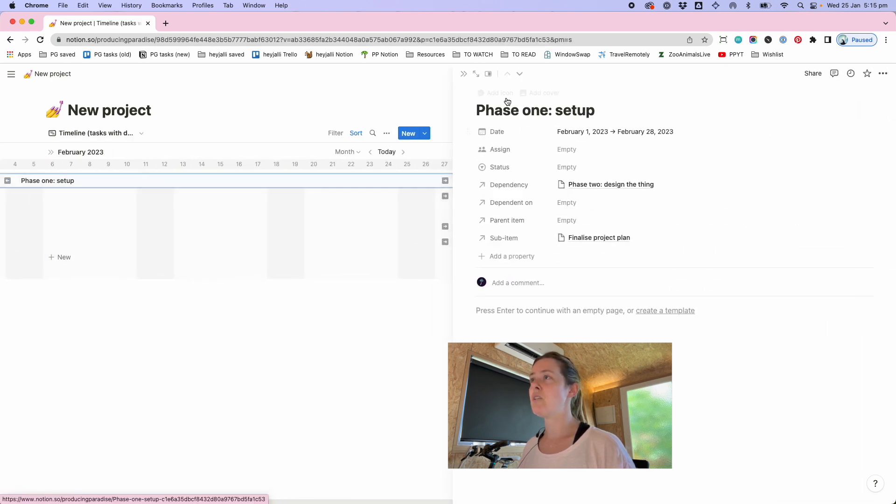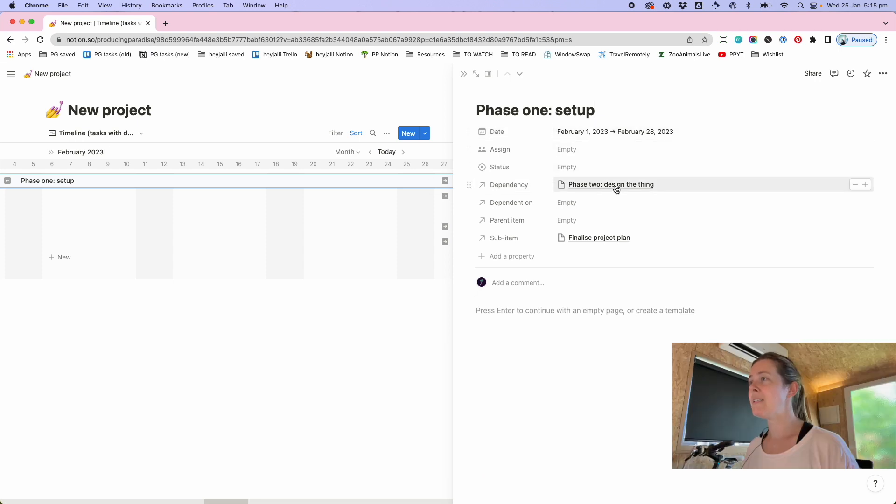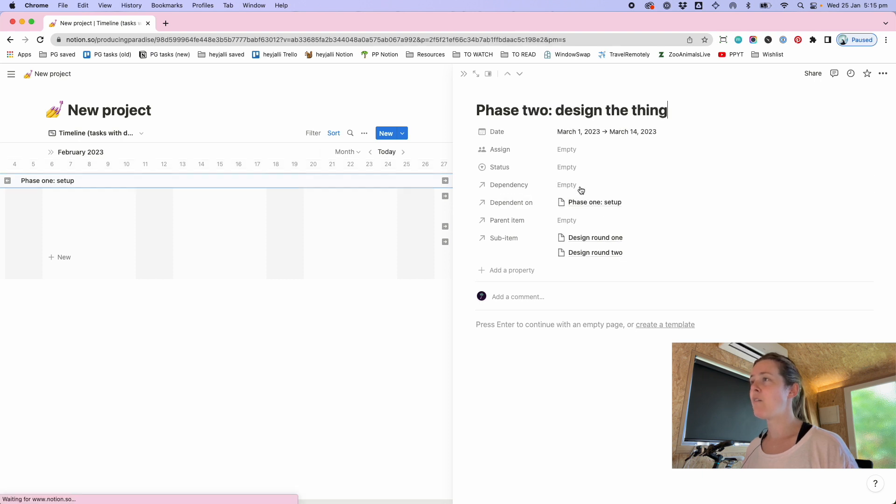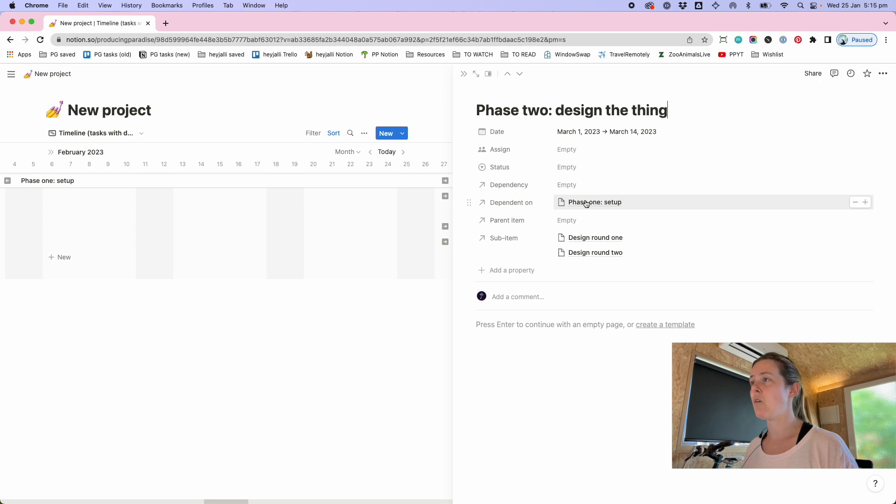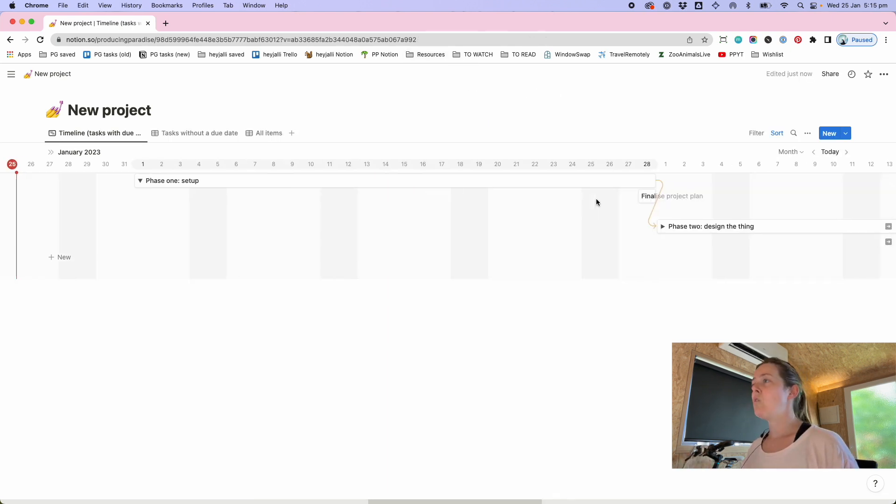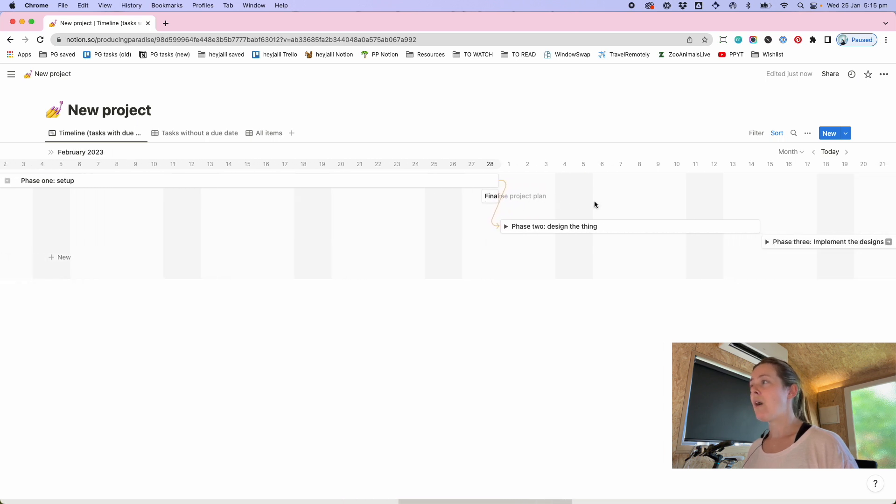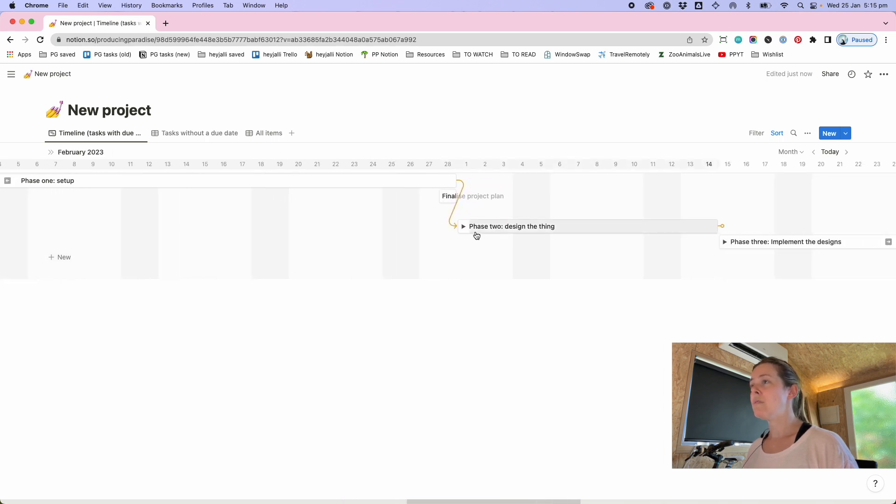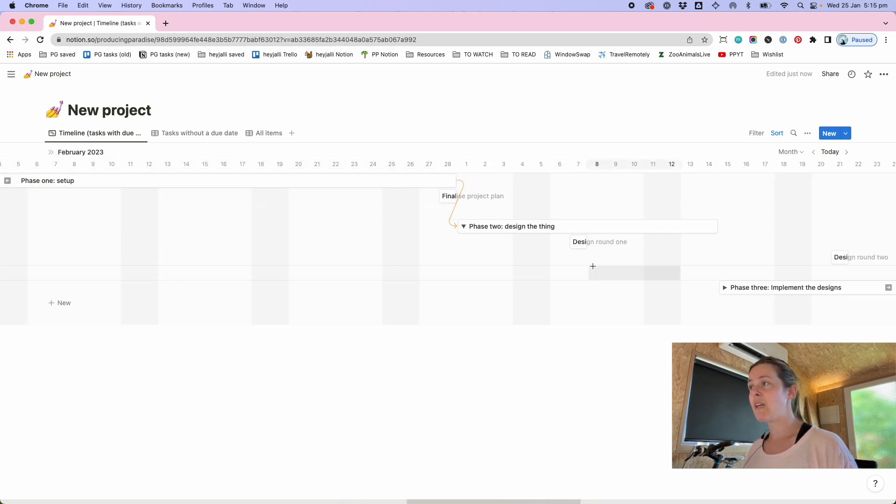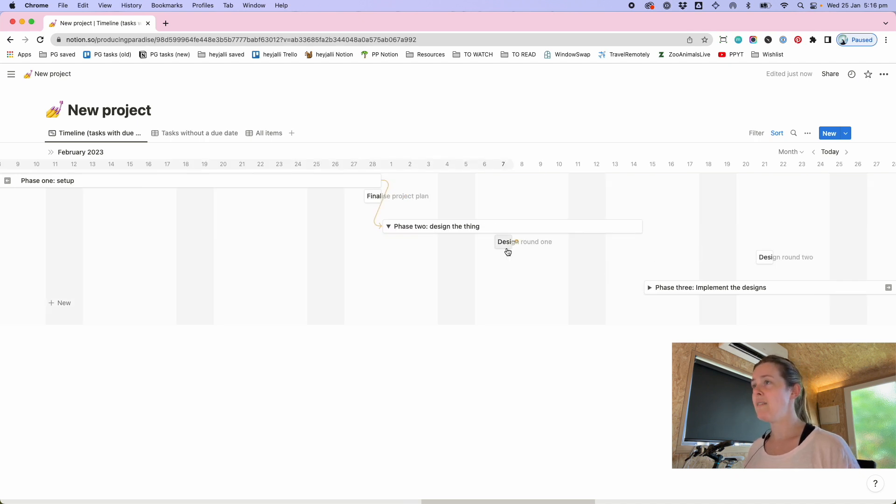So then if I was to click into this phase one you could then see the dates the dependency is phase two and it's dependent on nothing and then if we went into phase two it's dependent on phase one so it kind of shows there's that relationship between the two. You might want to go a level deeper and then have specific tasks that are dependent on each other within a phase.